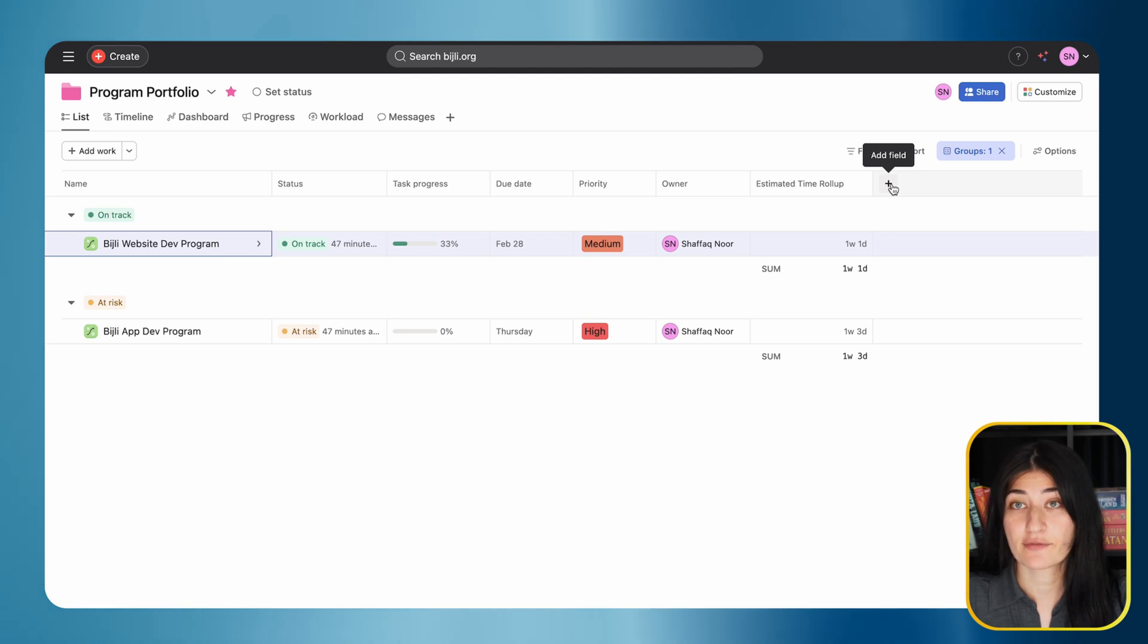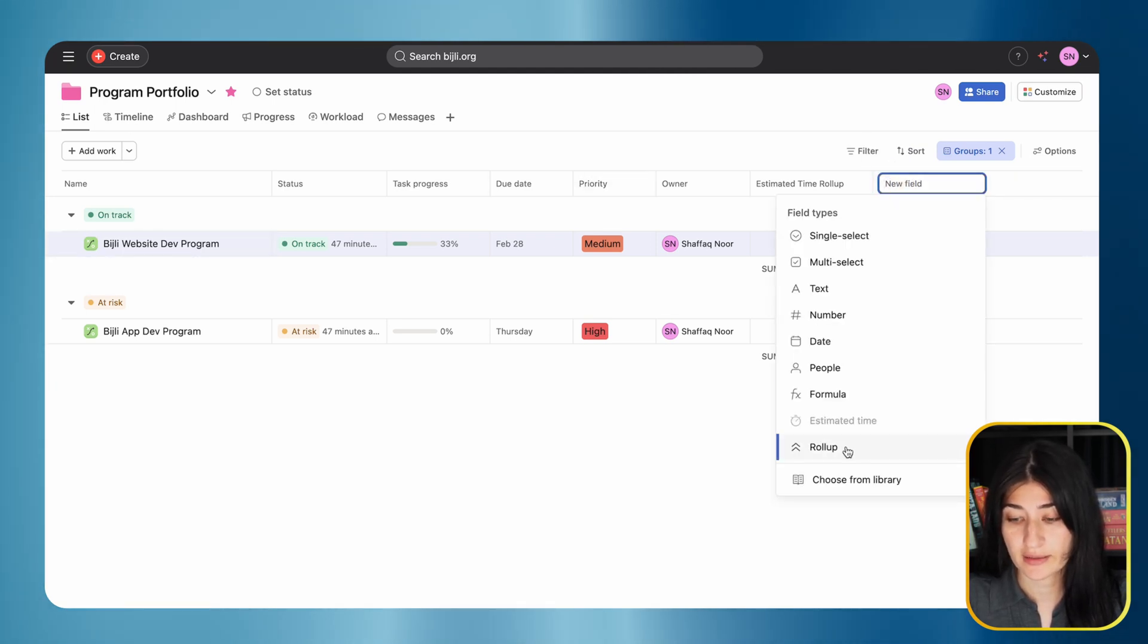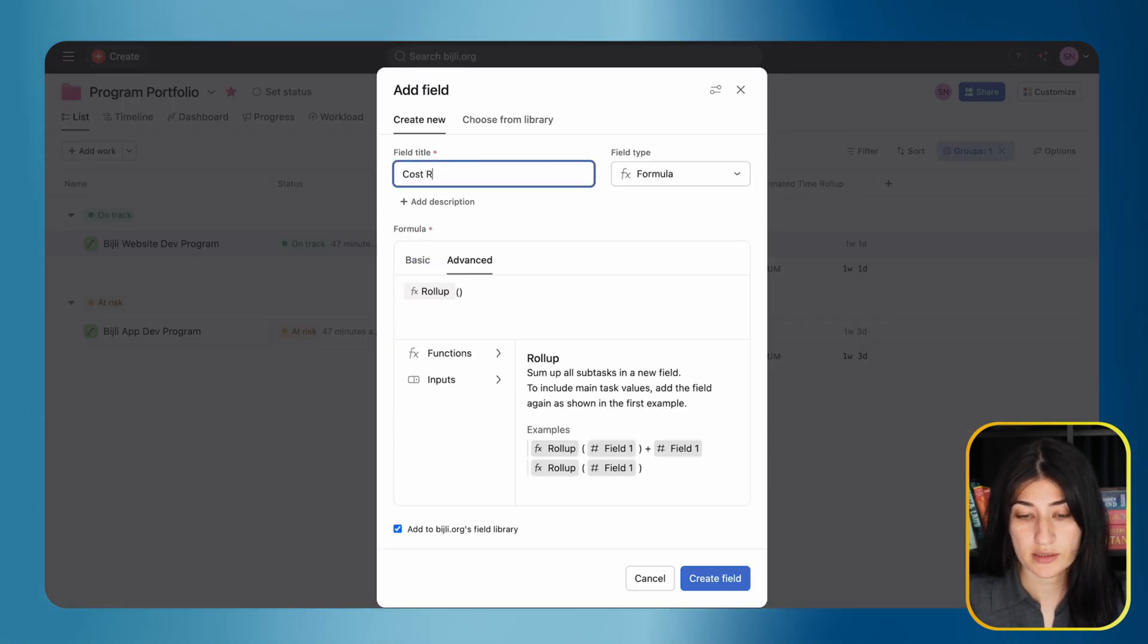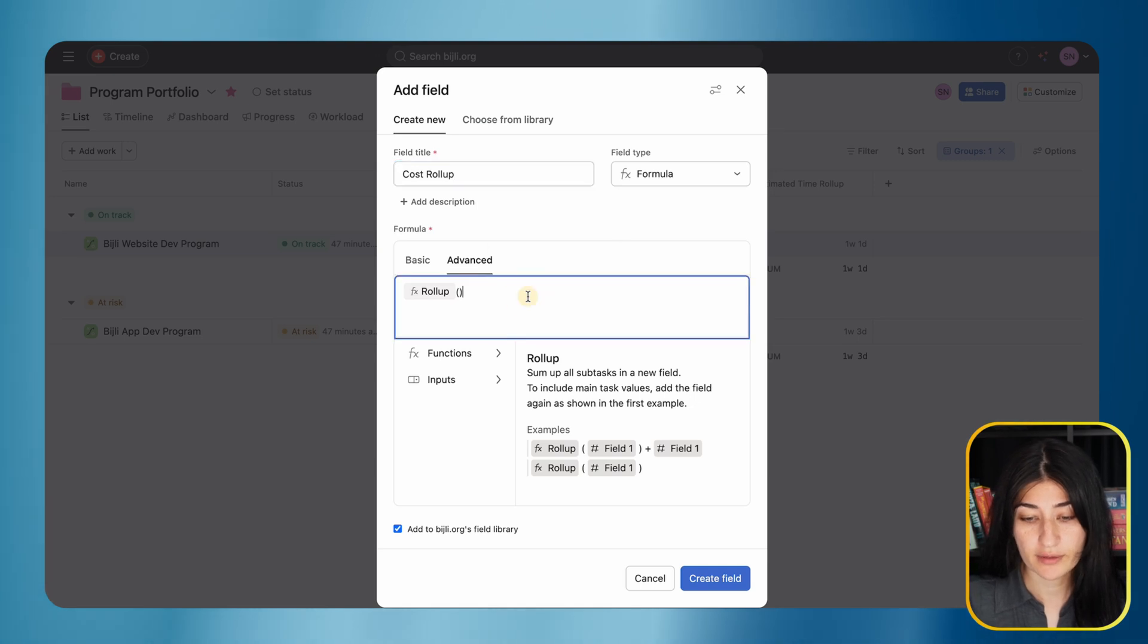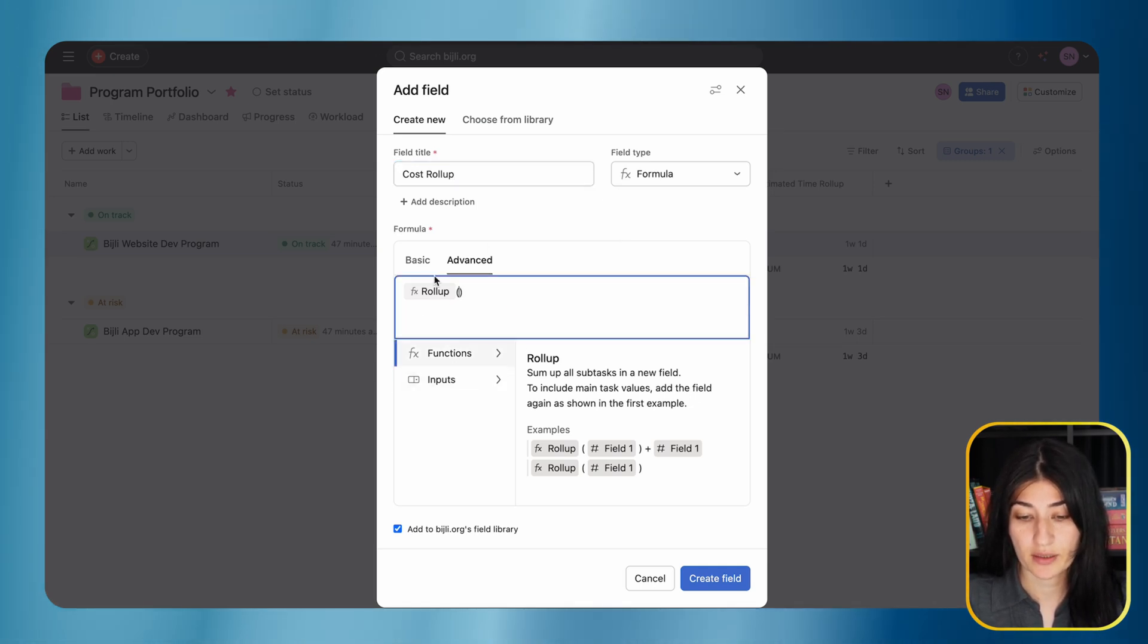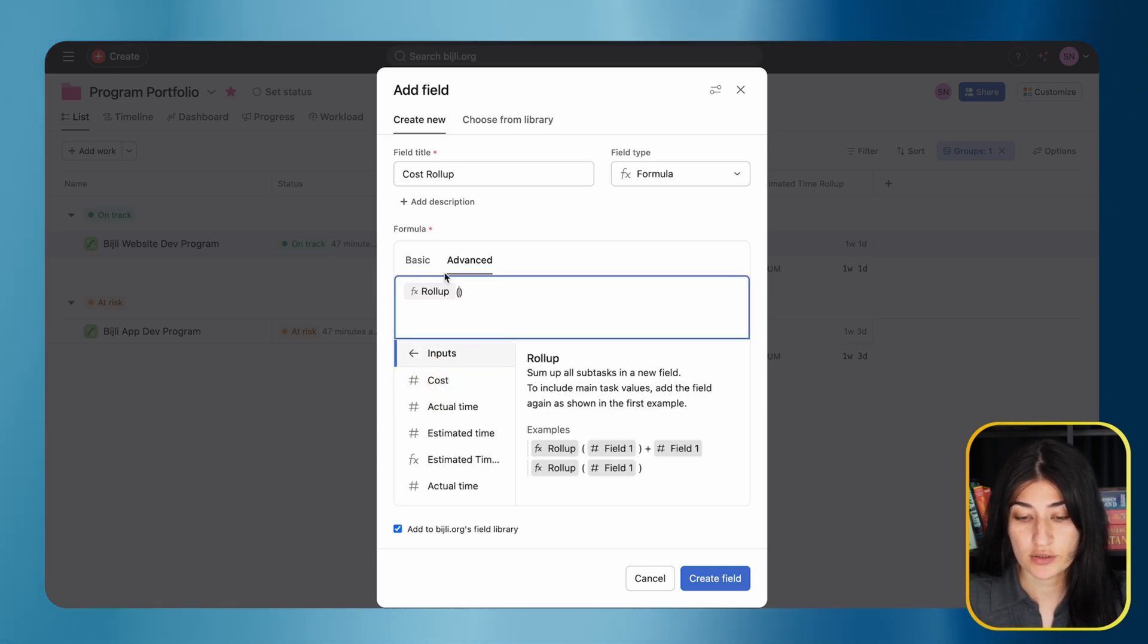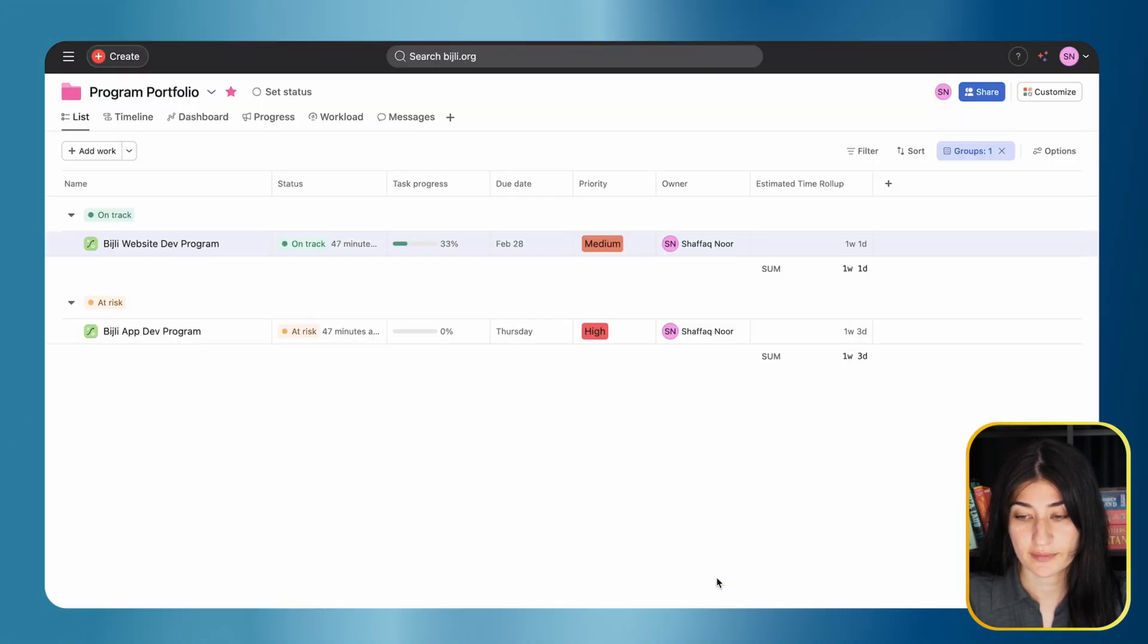Let's add a field. For the portfolio field, we're going to select the roll-up field type and name this cost roll-up. All I really have to do is put an input in here - the formula is already set for me. I'm going to select the cost field as my input and hit create field.